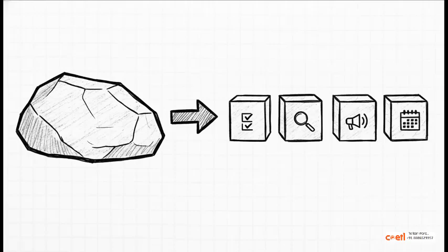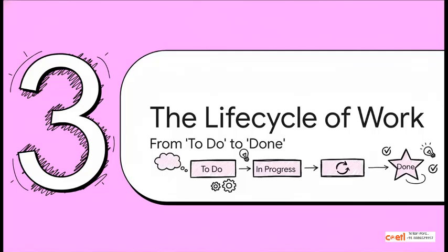And boom, this just perfectly illustrates the concept. The team's big stone to carve is the epic training planner, but look how quickly it's broken down into smaller, way more manageable user stories. Instead of one vague, giant goal, the team now has 4 clear things to work on: preparing a plan, reviewing it, publishing it, and listing the schedules. See how that works? So now that we have our stories, how do they actually go from being just an idea to a finished, working feature?